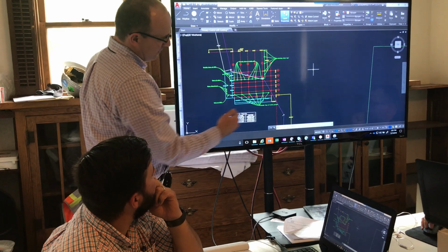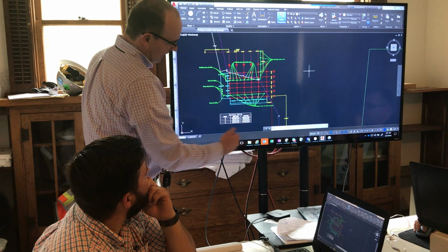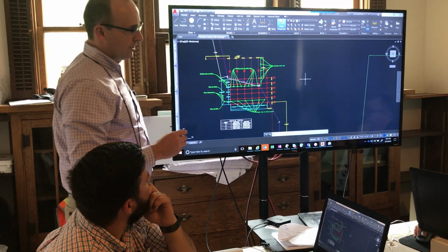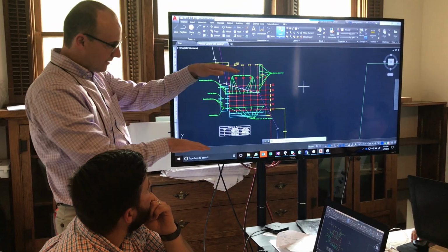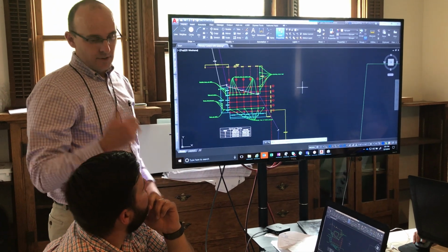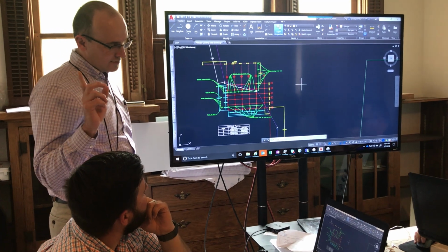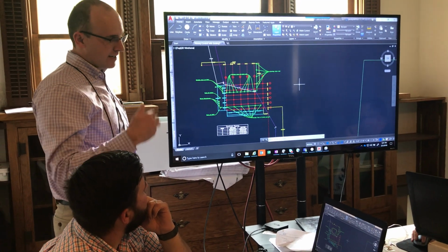And just in case anybody's curious, where this green is, the existing building also goes down and over, and we have renovations. We laser scanned all of it, we took elevations around all of it, we did an as-built of everything. So we know when we tie into that building, we're not going to find a floor that's high, it's not going to be offset, we're not going to have the wrong size gap. We did that at BSRL 2, and it was fantastic. One of the lessons learned was maybe just taking it a step farther.